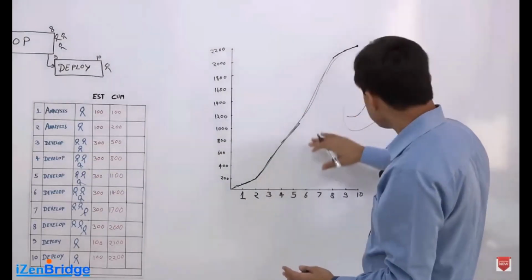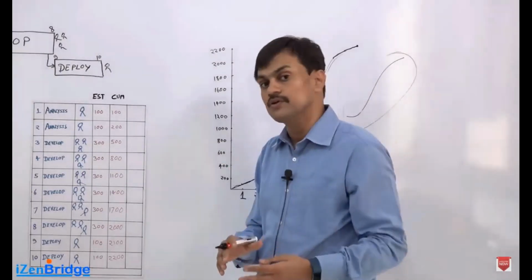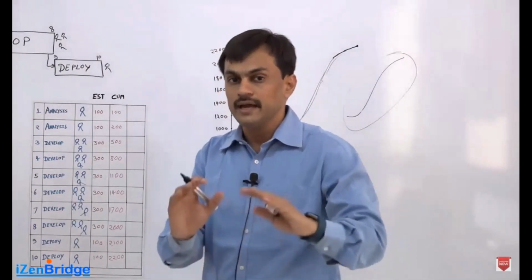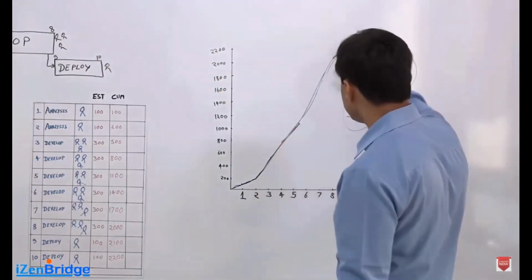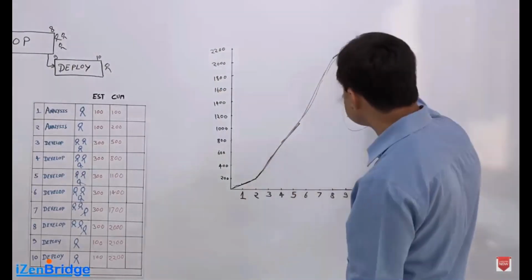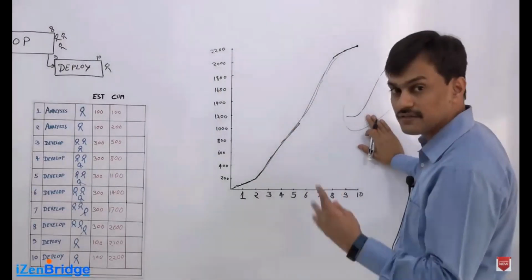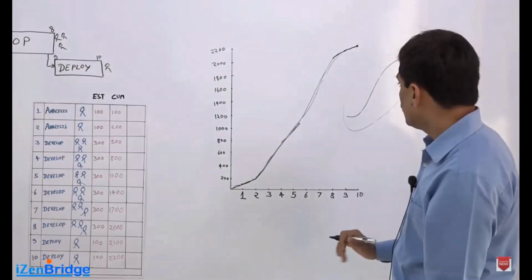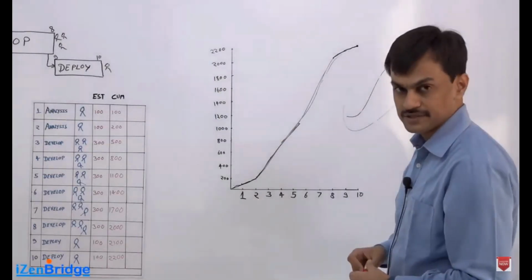But as we reach towards the end, again it is expected to have less number of people working on it, because it's just a deployment, the main work is already done, and the curve goes down. And that's the kind of mark we see in our S curve. So this is how our cost estimations are going against the time. You will see this graph again and again, and we will use it for monitoring and controlling purposes as well. Now the topic comes, how do we reconcile the funding limits?